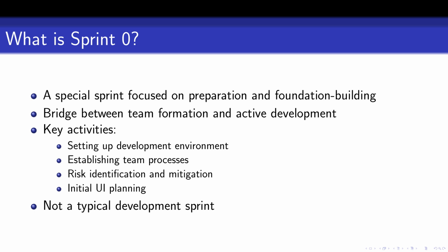Sprint Zero is all about preparation and foundation building. It bridges the gap between team formation and active software development. Key activities include setting up the development environment, establishing processes, identifying risks, and initial UI planning. Unlike regular sprints, it focuses on setup and learning, not feature delivery.